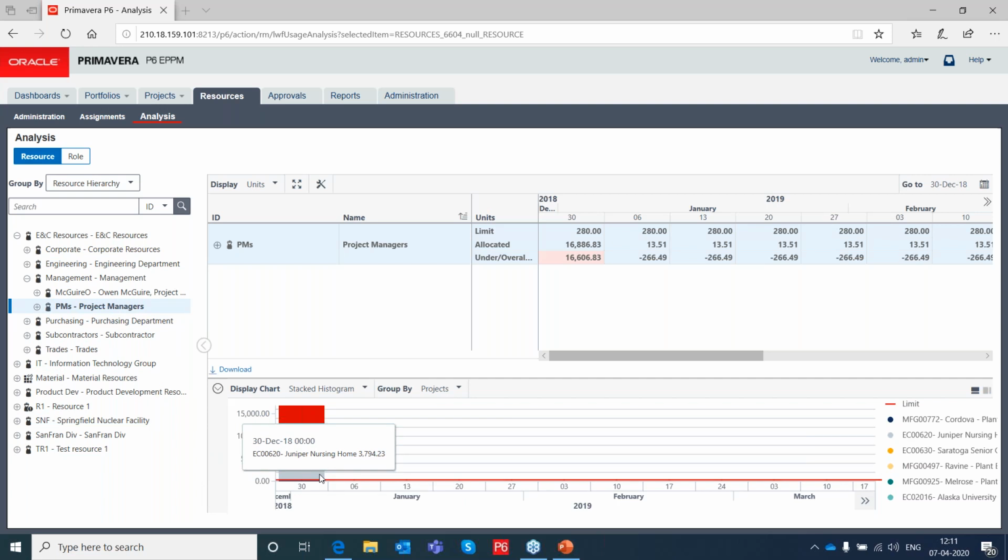So this is the main advantage of using the EPPM, because as an enterprise one, we will be having a centralized database deployment where the admin can push a full resource list of a company, and they can allocate it for various projects, so that we know how many resources are available and how many are already in projects. Resource utilization and capacity planning across an enterprise are very much possible by using EPPM. Not specific to a project. Project wise also you can perform it, as well as company wise, division wise, whichever way you want to do it, you can do it, of course.